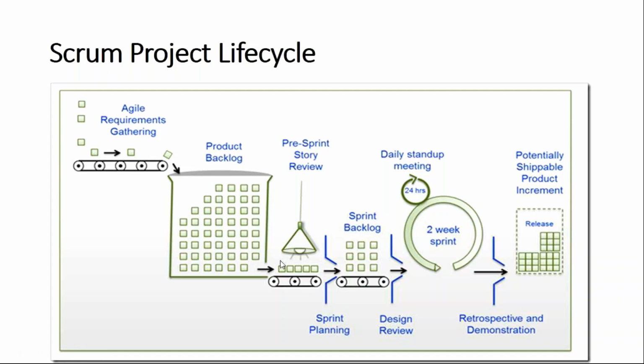There is a concept in Jira of whether those user stories are in a defined stage, whether the definition of ready and the definition of done conditions have been reached, and whether the team's open questions have been addressed. Until those stages are reached, those stories will not be pulled into the sprint backlog. That means they are still not refined.